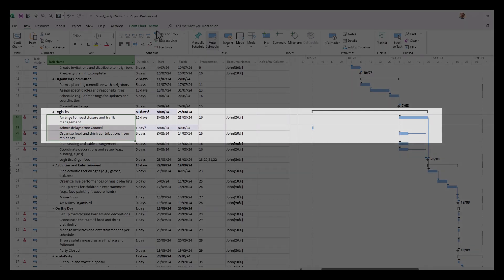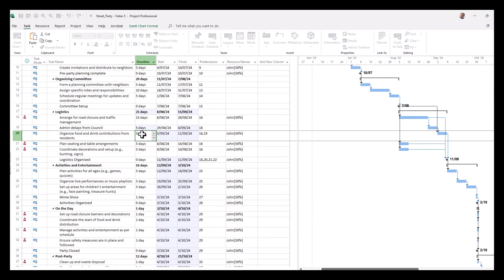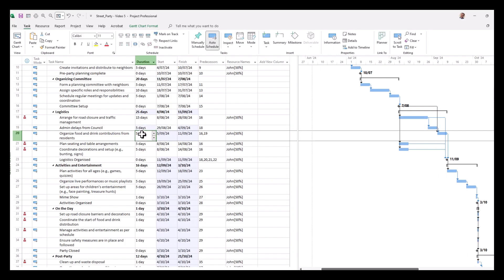So we select those three and then go and click the link. There you have it. We're going to assume it's going to take us five days of delays. So you can see it has consequences for the entire project.